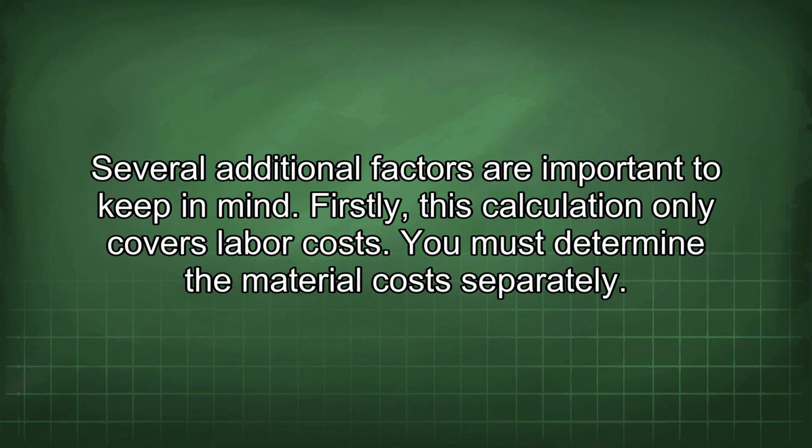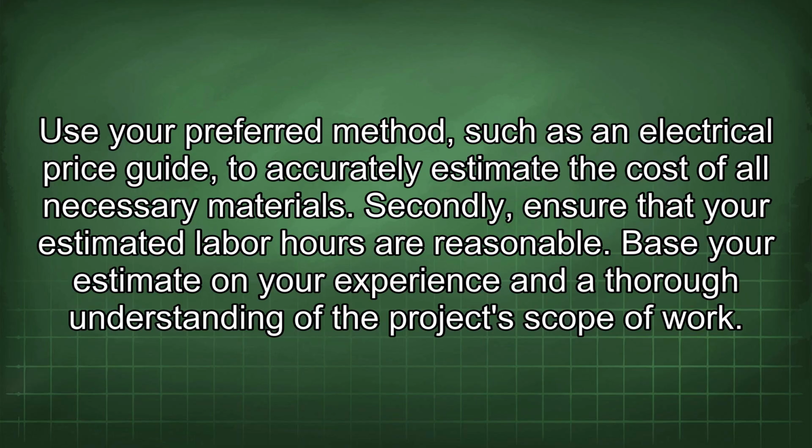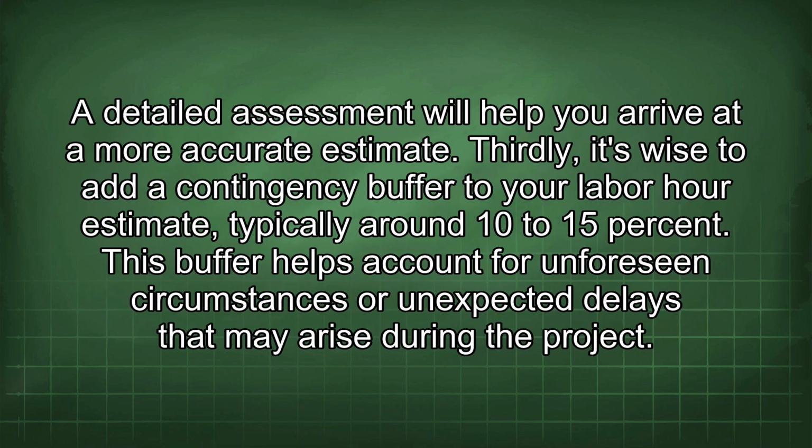Several additional factors are important to keep in mind. Firstly, this calculation only covers labor costs. You must determine the material costs separately. Use your preferred method, such as an electrical price guide, to accurately estimate the cost of all necessary materials. Secondly, ensure that your estimated labor hours are reasonable. Base your estimate on your experience and a thorough understanding of the project's scope of work. A detailed assessment will help you arrive at a more accurate estimate.